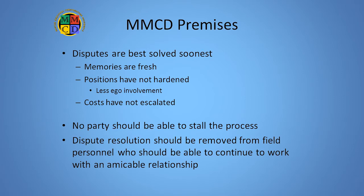Two, no party should be able to stall the dispute process for any reason, let alone for strategic advantage. This includes the contract administrator.